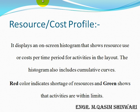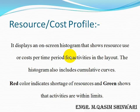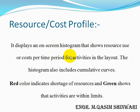Resource Cost or Cost Profile displays an on-screen histogram that shows resource use or costs per time period for activities in the layout. Actually, the histogram also includes cumulative curves.